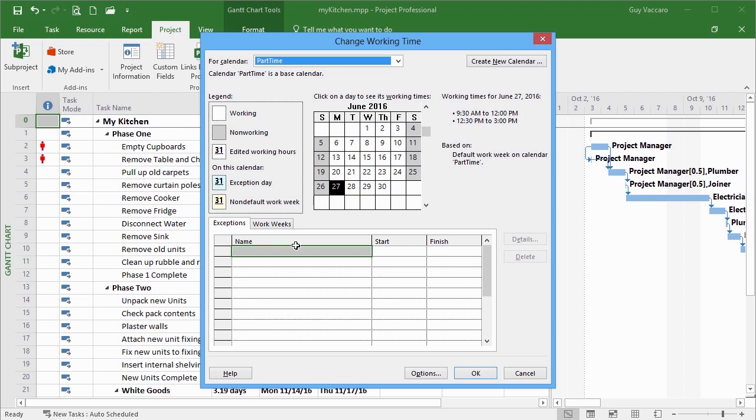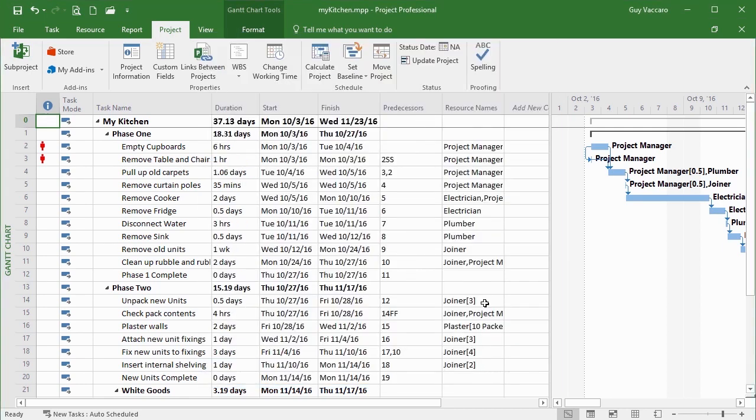So in the case of the resources themselves, we put in individual holidays. In the case of the part-time calendar, we may just need to put in public holidays because even though they're working not all of the day on a public holiday, they still get that day off. So that's adding a new calendar. That calendar is then applied to individuals within your project. That calendar is only available within this project.